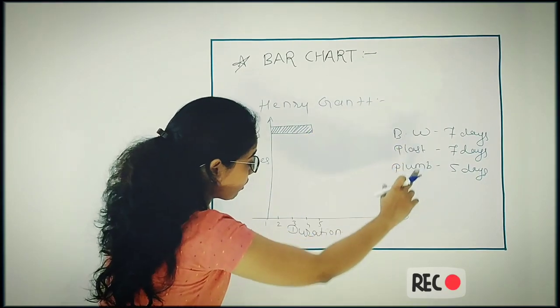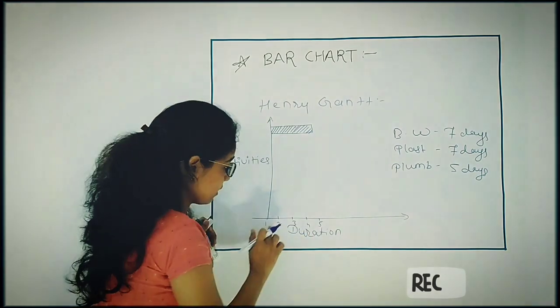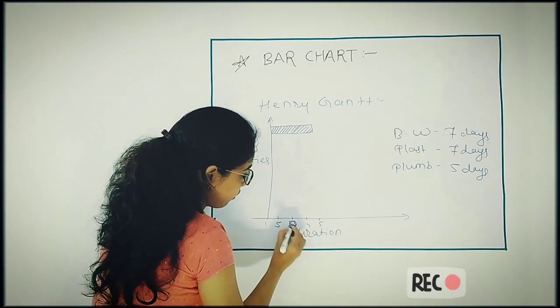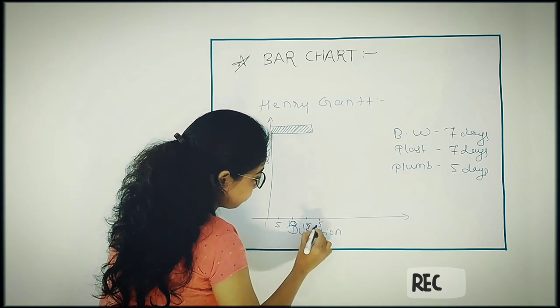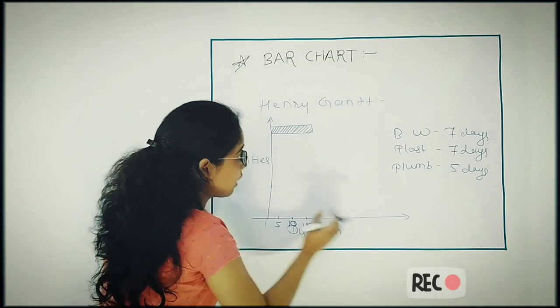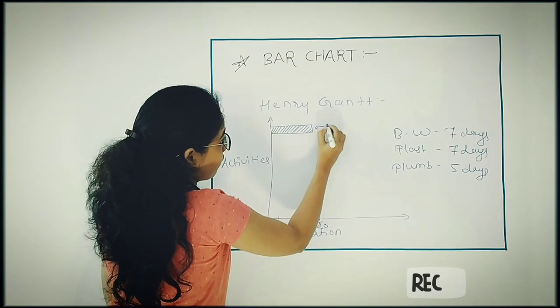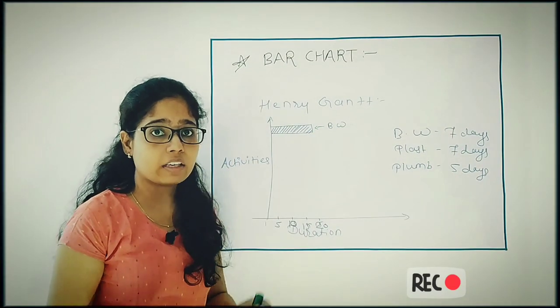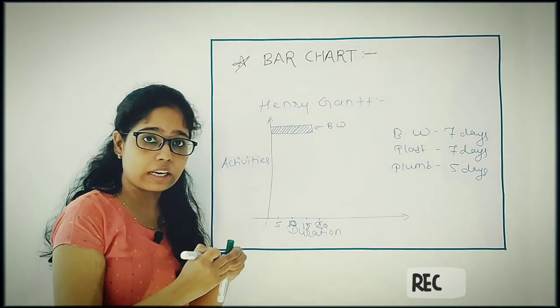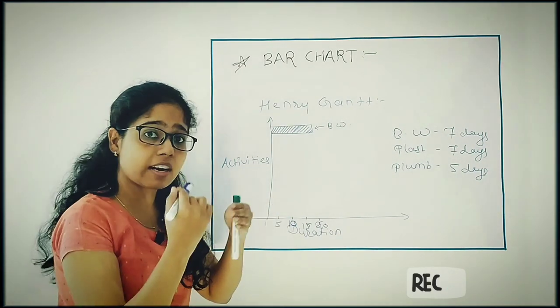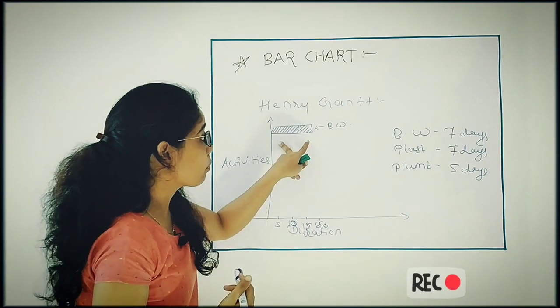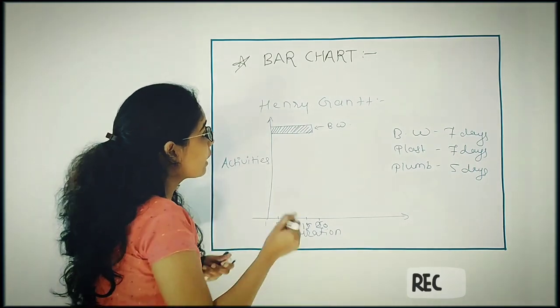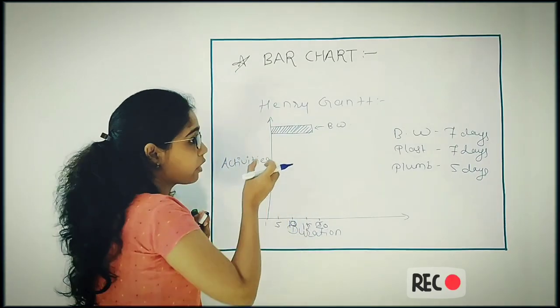First activity is your brick work having duration seven days. Let me assume one centimeter is equal to five days. So this is my scale, and this is my first activity, brick work. Now second is your plastering. I have to see on that particular schedule that my plastering may start simultaneously or after the completion of whole brick work.